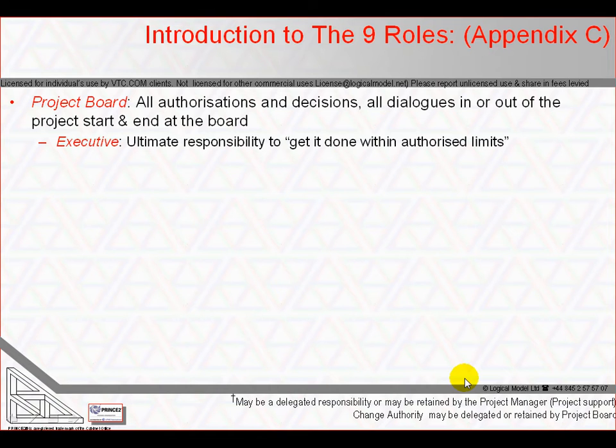Throughout the project, the executive is responsible for the business case. And the manual says, in bold, perhaps the only time it uses bold, the project board is not a democracy controlled by votes. The executive is the ultimate decision maker and is supported in the decision making by the senior user and senior supplier. There is only one vote on the project board, the executive's.